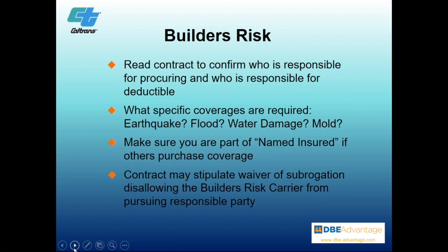You want to read the contract because usually as a builder, there are stipulations by the owner of the project in this regard: who's responsible for getting this insurance, what the deductible is, and how that's handled. There are specific coverages sometimes that are or are not required: earthquake, flood, water damage, mold.